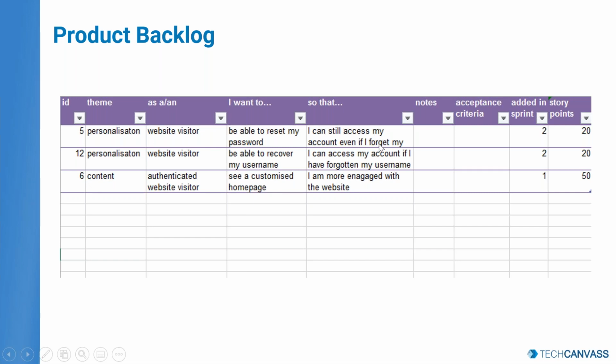Second, you have a list where you can see the priority. How is the priority? 1, 2, 2, meaning 1 is sprint number 1, that is to be done first. These two are to be done later. That is sprint number 2, iteration 2.